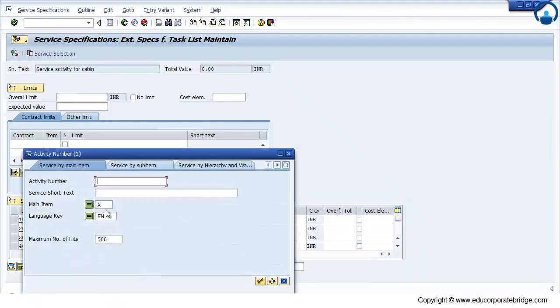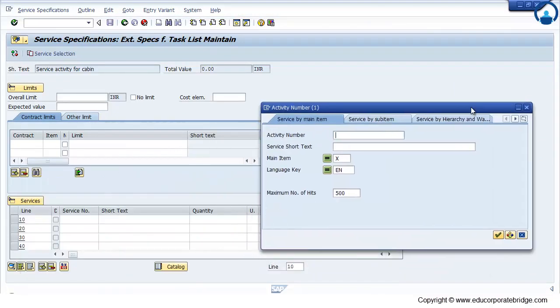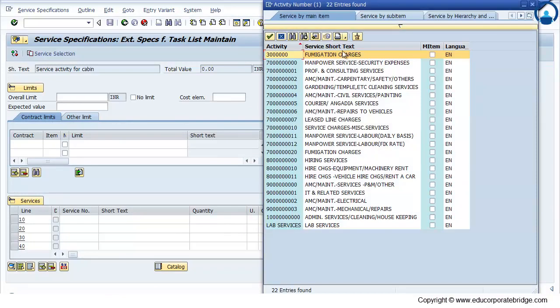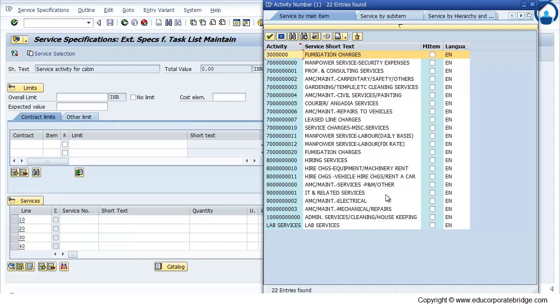Now you can maintain a short text or a service. Services are maintained in a service master. Like a material master, there is a service master. So if there is no appropriate service in the service list, you can create the services through service master, through ACMN01.